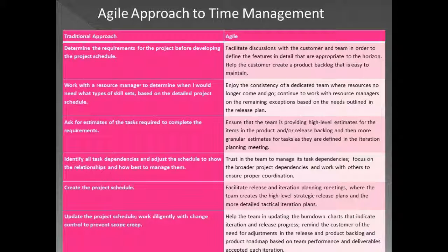Moving on, if you talk about determining the activity duration, that is, estimate activity duration, here we ensure that the team provides high-level estimates for the product backlog, and then more granular, more specific estimates for the specific iteration or the specific release that we are planning.